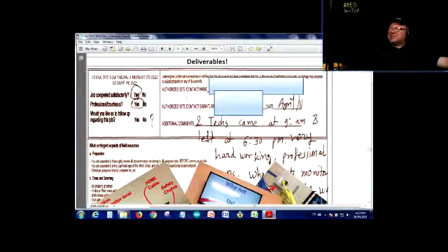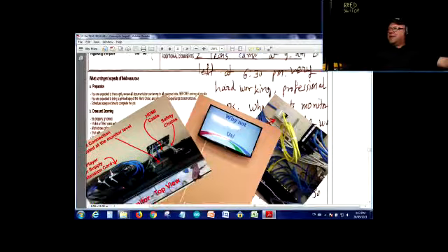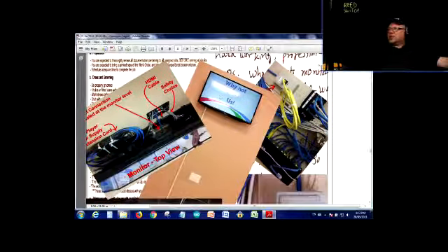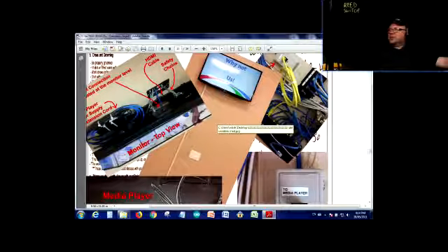So this is a different work order from a different company. Obviously, I blanked out the signatures for obvious reasons. And I just put a bunch of things. So you take pictures. This was one of the pharmacies in Brantford that we did years ago, and you do the as-built pictures or the deliverables as they ask you. I ask you to take a couple of pictures just for practice, but sometimes you have to take 40, 60, 80, 100 pictures, and they have to be done in certain ways. So we're practicing what you're going to have to do later on.